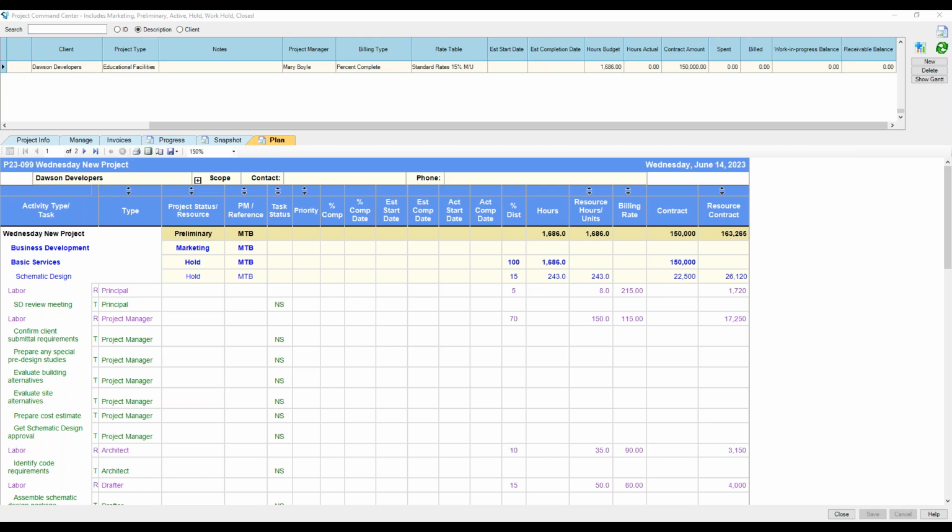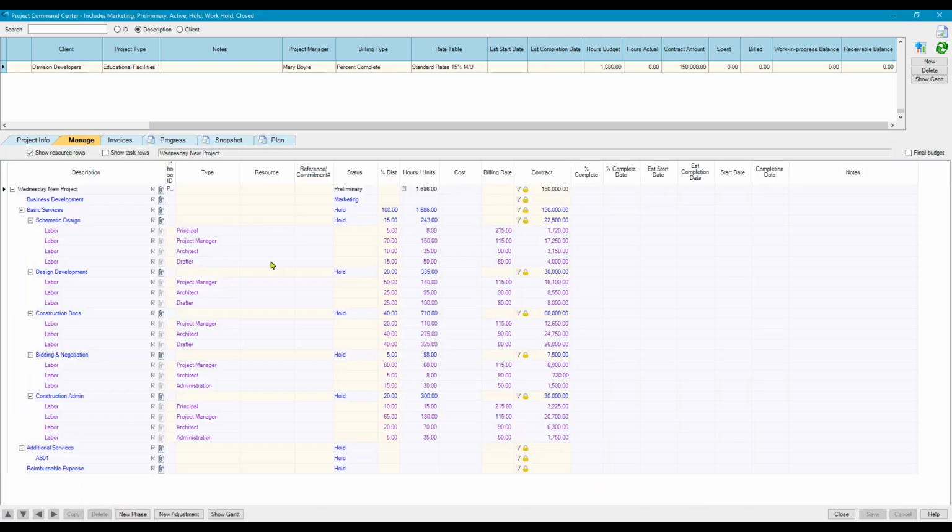I think what you're asking, Matthew, is do you ever recommend skipping this and putting in names? We actually recommend avoiding that if we can, only because in most firms, people have to be pretty fluid. And we then have to create rate tables by employee name, which we want to avoid if we can because they're much harder to maintain.